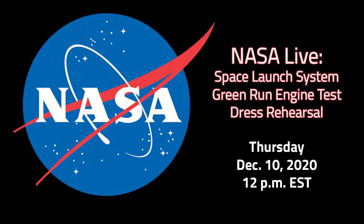Yes, thanks, Philip. So our plan will be to go down to the 33 seconds. Some of the analysis that's being conducted right now is looking at the new procedure to ensure we can do the 2-hour hold. If we have to reduce the time period in order to make sure we have enough locks available, we would likely reduce that 2-hour hold, which is where we would get some margin back if this new procedure requires us to have more commodities available to do this earlier part of this procedure.